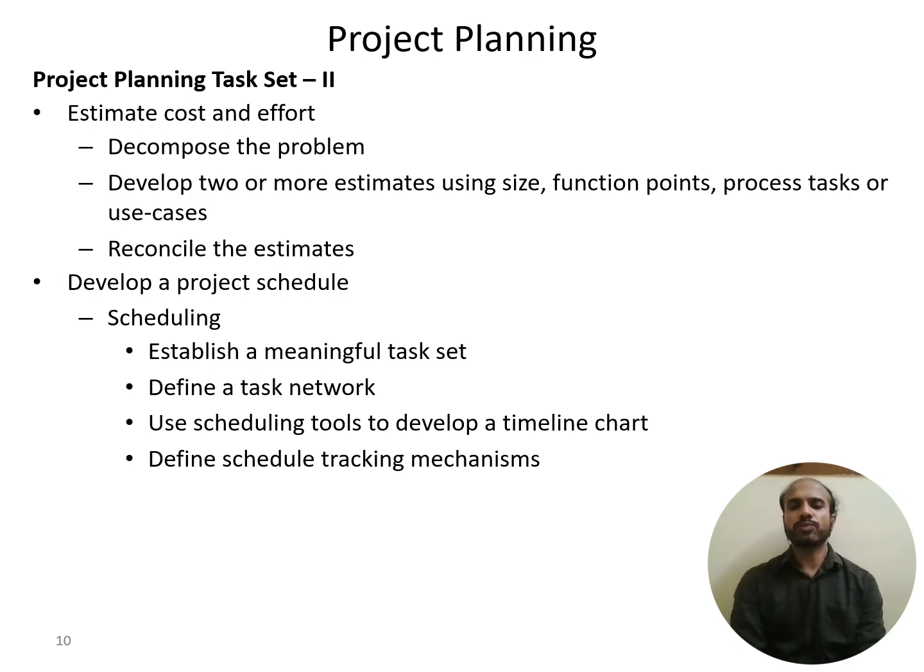You need to decompose the problem, develop two or more estimates using size, function points, process tasks, or use cases, reconcile the estimates, then develop a project schedule. That is a meaningful task set: defining a task network, and using scheduling tools to develop a timeline chart. Then you need to track that particular schedule.